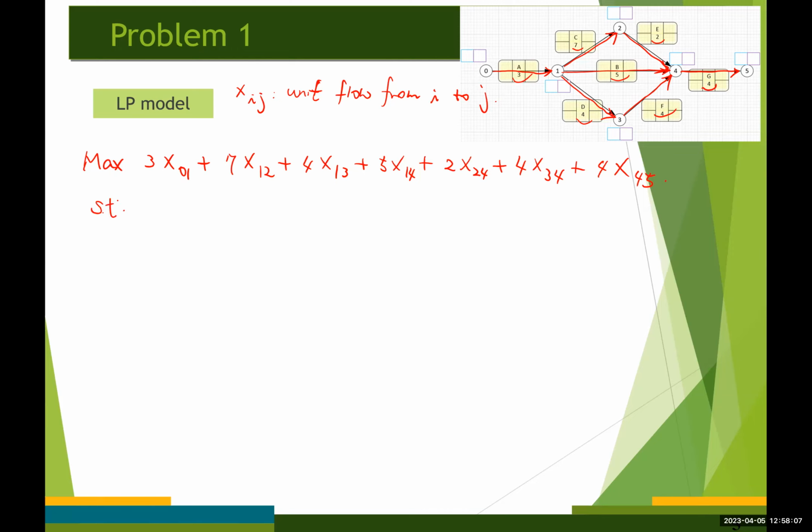And we've learned that last time, the constraints of the dual LP are the conservation of flow equations for this AOA network diagram. Okay. So the left-hand side of each constraint is going to be inflow minus outflow. So that the right-hand side value becomes the net flow amount.